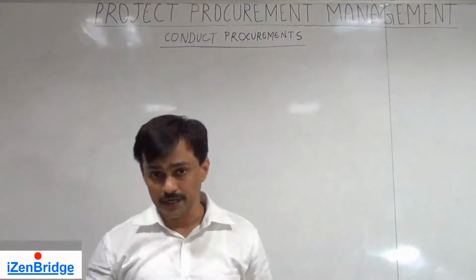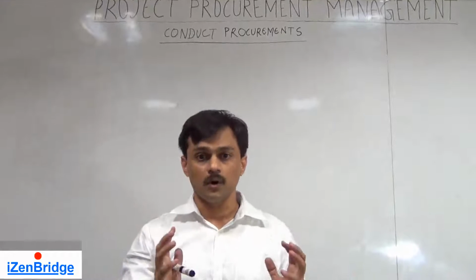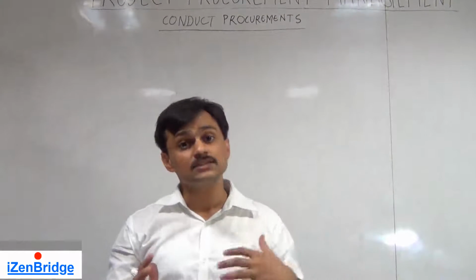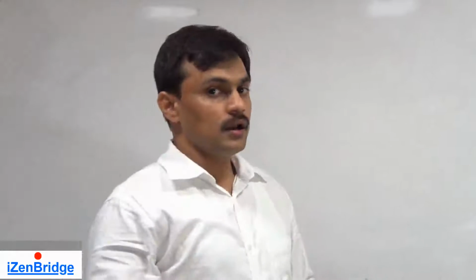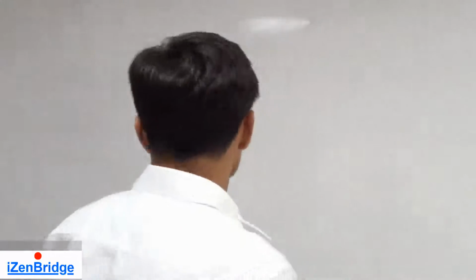Conduct procurement process is all about seeking sellers' responses against the procurement statement of work, evaluating sellers against source selection criteria or various subjective and objective criteria, and then finally giving a contract or awarding the work to a selected seller.